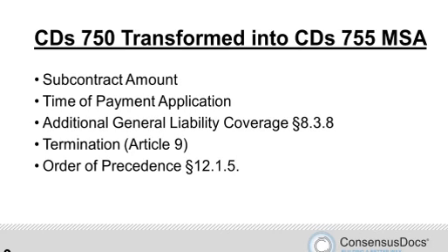The bottom line here is that that alternative approach was spelled out in the 750, an OCP policy, Owners and Constructors Protective Insurance Policy. In the 755, the election was made that this is something that the parties will typically address on a project-by-project basis, and therefore we will let the parties address that through the project work order.